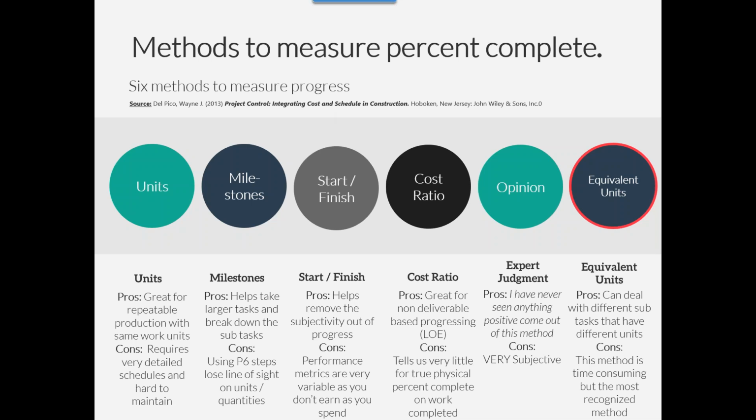The next really being opinion, which I really hate personally. I know some folks still kind of live and breathe opinion based or expert judgment. This is a little bit of humor, but I've never seen anything positive come out of this method. It's very subjective, and it oftentimes leads to arguments at the project level, especially if there's billing tied to it. If there's folks like us on our side where we're trying to validate progress, it's very difficult to just say, yeah, we're 33.3% complete. Well, how'd you get to that number?